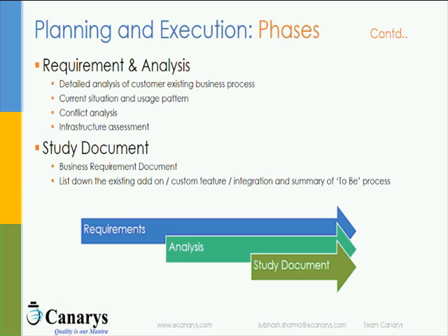The other important aspect to be discussed at this point is whether the client is using any add-on solution. I hope you are all aware that if you have an add-on solution installed, it has a different set of tables and objects, and the database resides in a different set of tables. So if you talk about data migration, you have to be careful because the migration toolkit coming from Microsoft won't be able to help you.